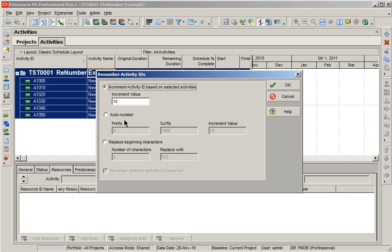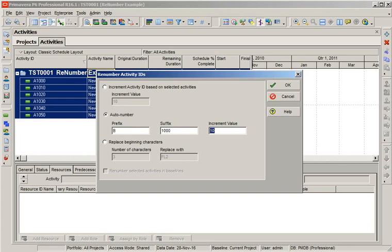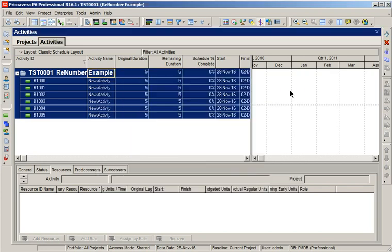And I am selecting auto number and I am changing the prefix from A to B and then keeping the suffix as it is. And I wanted to have increment value as one. Selecting one and clicking on OK.